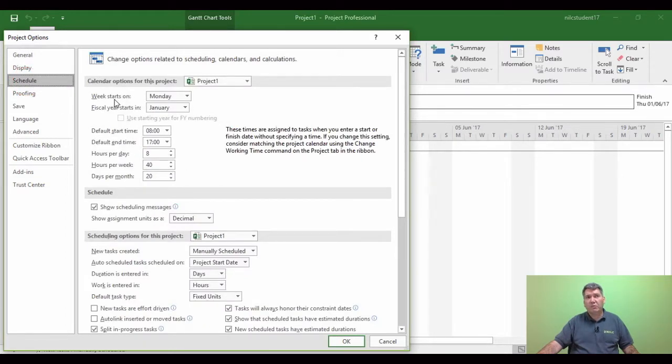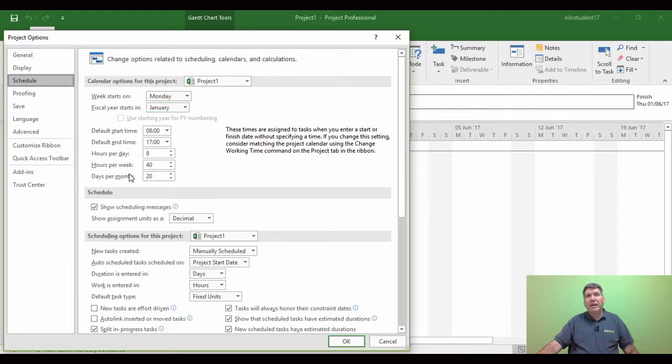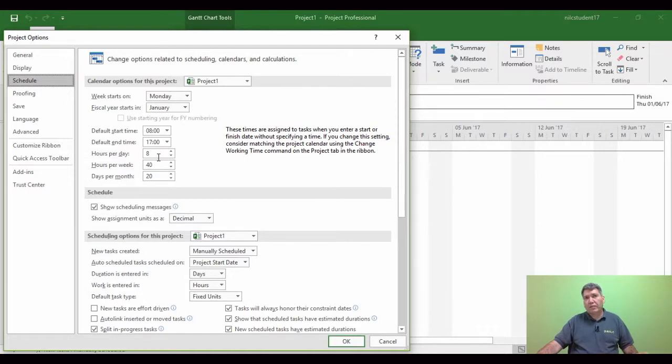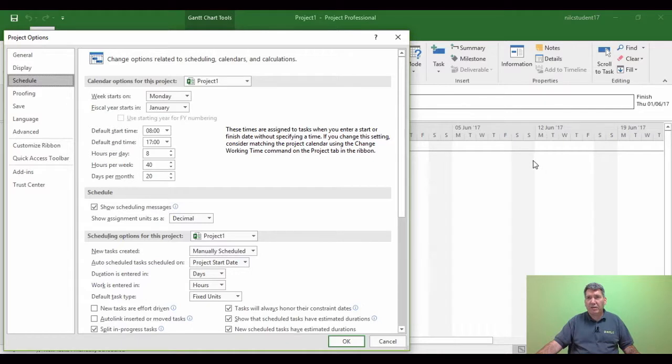Now underneath there we can see the work week starts on Monday. There are 8 hours per day and there's 40 hours per week. So these are the calculations projects working against. For example, the Monday I can see in any of these white areas might not be my start date of the week.